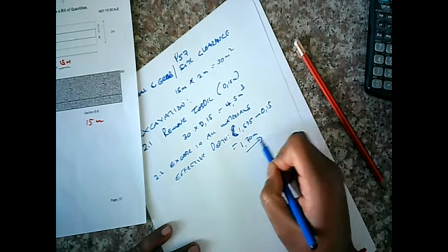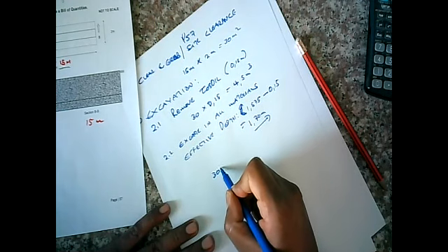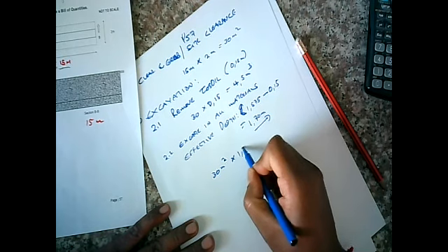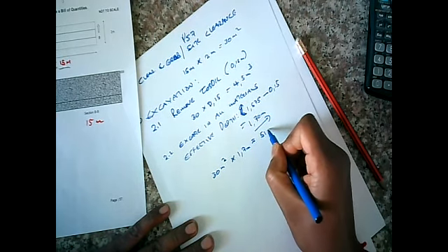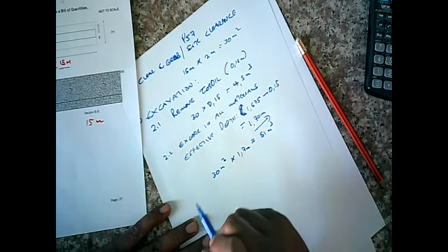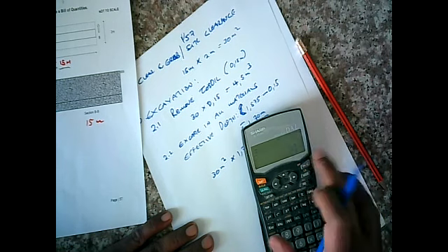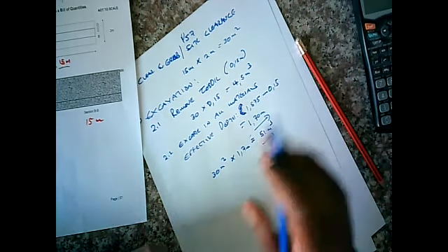Okay. Effective depth. So what's our volume? Our volume for our area is 30 meters squared, and our depth is 1.7 meters. We're getting what? 51 meter cube of earth to be removed. Let's check that out. 51. All right, 51 cubic meters to be removed.